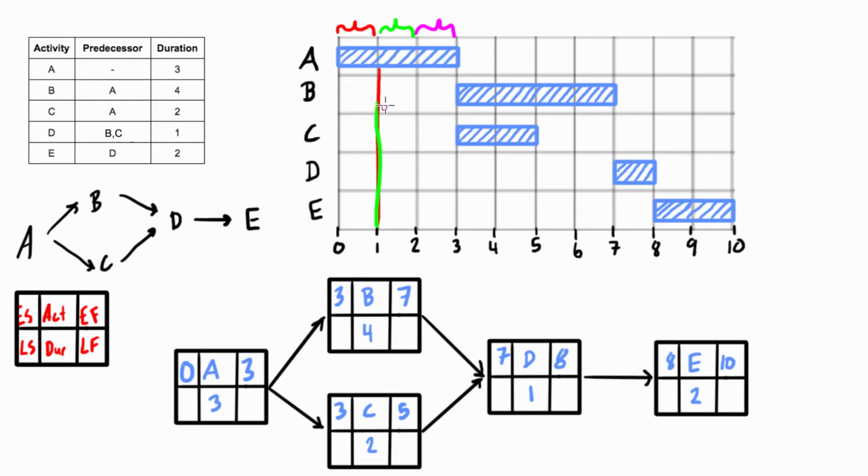This is what throws a lot of people off. They're like, well, how can that mean two different things? Well, look at it. This is literally right here. This is the beginning of day 2 and also the end of day 1. The same logic is going to apply to the next one. So for the number 2 here, it's going to refer to the end of day 2 and also the beginning of day 3.